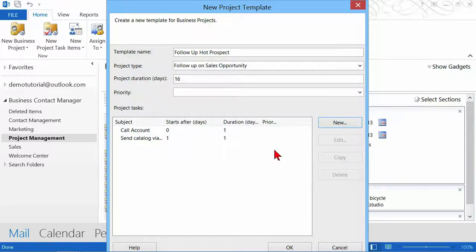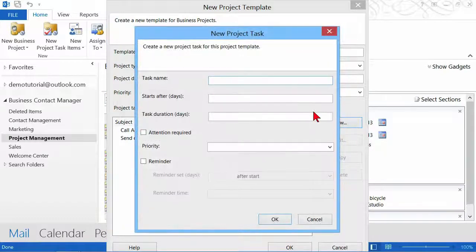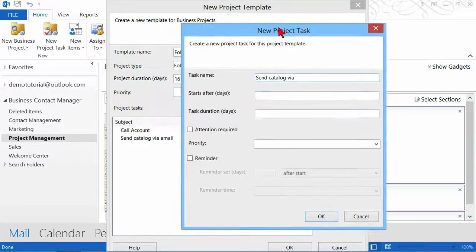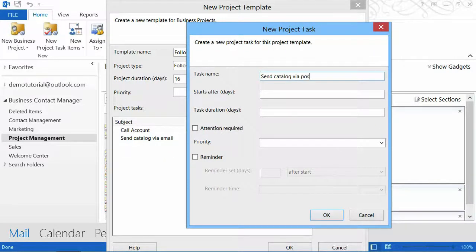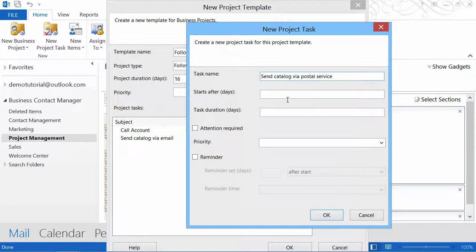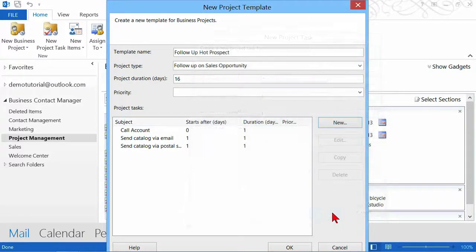My next task, Control V on my keyboard. I sent it via email, now via postal service. This starts after one day, and I'm going to give myself one day to accomplish that task.